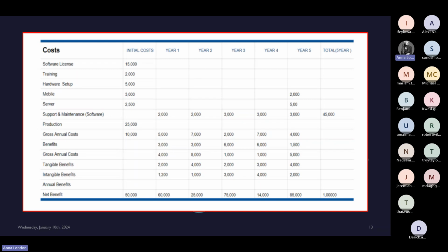Man hours. Excellent question, by the way, and great observation. For instance, if you are streamlining a process, and you're taking into consideration, like I mentioned before, let's say there are 7 stakeholders in the entire process, and this is going to cut time by, let's say, 2 hours per day from just one team. Everybody else stays the same. It just automates it a little bit. But for that one team, which has been doing it all manually, it saves 2 hours per day.